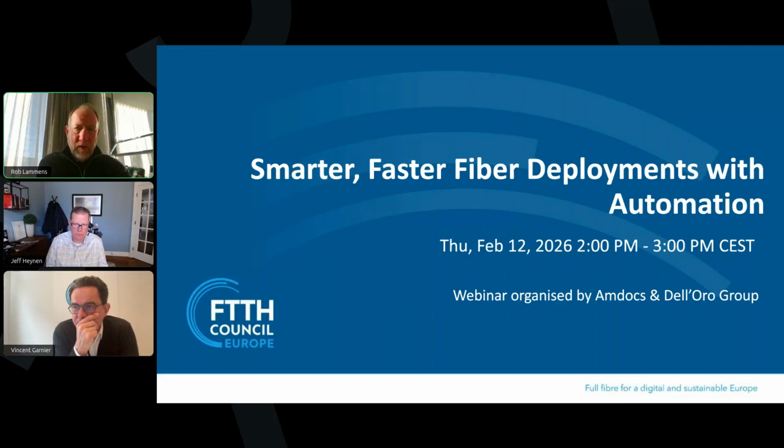In our model, we spend a little extra time in the field. We make sure that what we see in the field is validated. We may do a high-level desktop design, but it's always validated in the field, so we get real-world access to what's changing. We've seen instances where that doesn't happen, and all of a sudden we're trying to design fiber through a swimming pool or through a right-of-way that nobody knew existed. And so it's important that you find a balance in that.